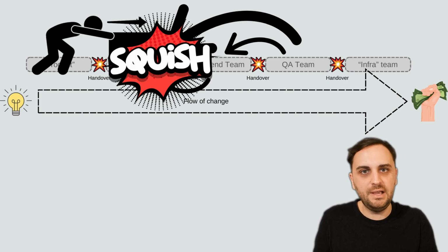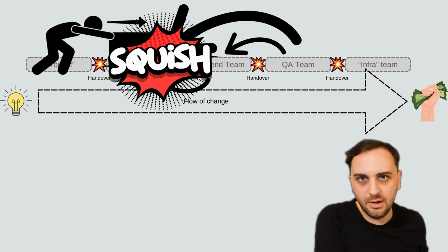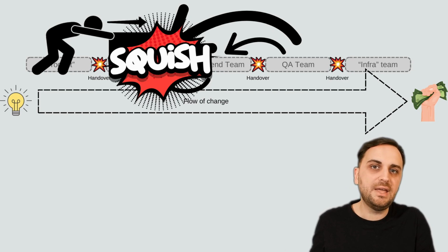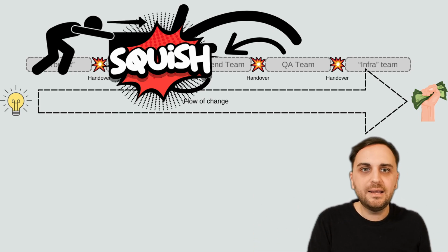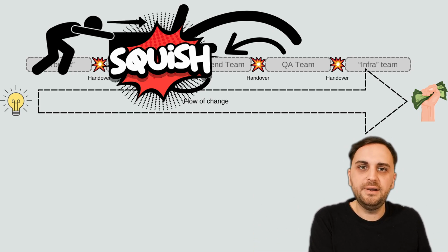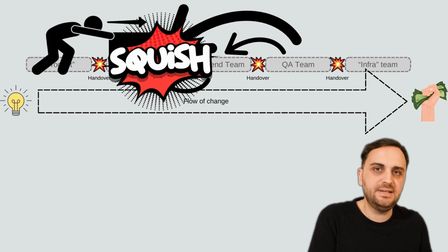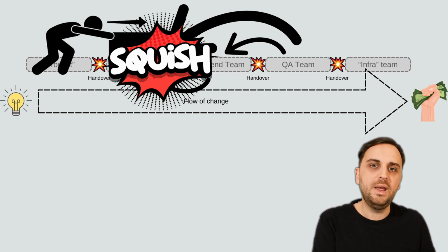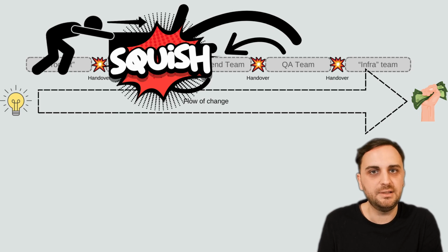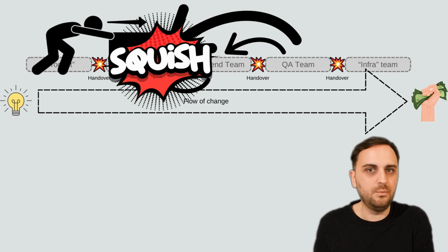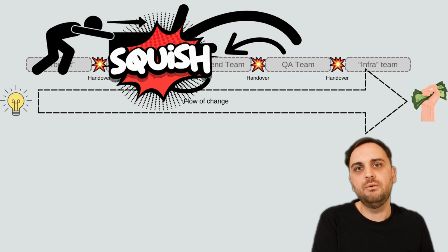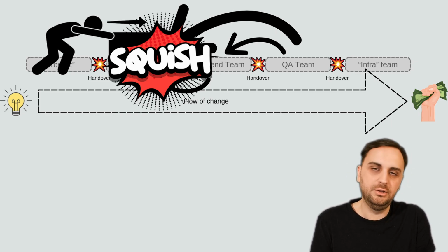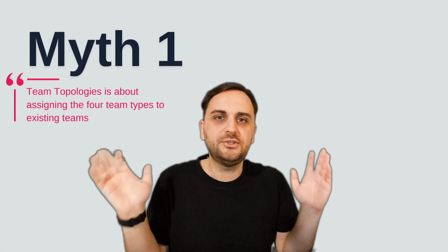So they're going to have to put down and forget what they're doing and start building some new context on something else. And then when it's time for that backend API that might have only taken a few hours to change, when that comes back into the work queue for that next resource pool, that front end team is already occupied working on that last task. So are they going to, again, waste time context switching and going back to something and rebuilding context, figuring out what this thing is, what change did they make, does it work, and then push it back up to the next team? Or are they going to say, well, if we're going to wait a while until we're done this thing, then we'll come back and pick that one up because it's the next in queue? Doesn't matter. They're all slow situations.